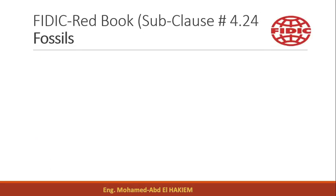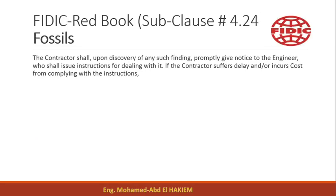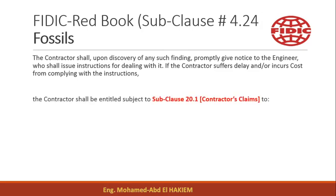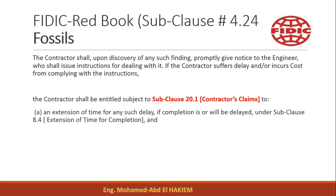Cause 5 – Fossils. The contractor shall, upon discovery of any such finding, promptly give notice to the engineer, who shall issue instructions for dealing with it. If the contractor suffers delay and/or incurs cost from complying with the instructions, the contractor shall be entitled subject to subclause 20.1 (Contractors' Claims).